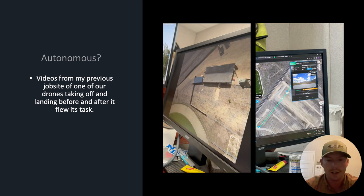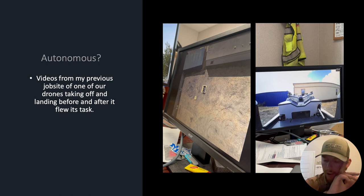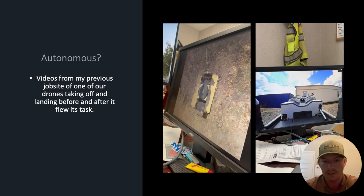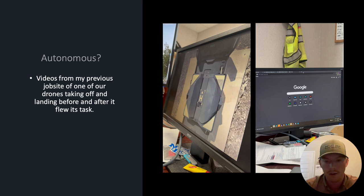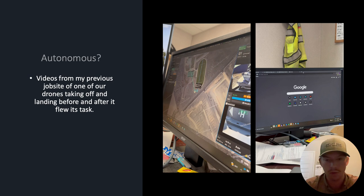So autonomous — I'm going to play these two videos real quick. This is a drone we had on my old Bartlett Coff job site; it was actually autonomous. It flew three times a day, seven days a week, and got accurate 3D modeling of the entire job site over 107 acres. This thing takes off from its hub right behind our job trailer. We just set a path for it, it goes, and gives us the model, and we can do some pretty cool things with that.